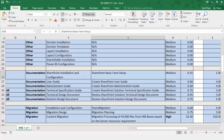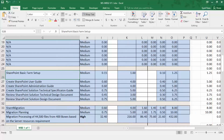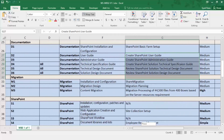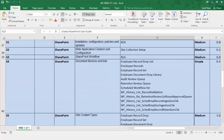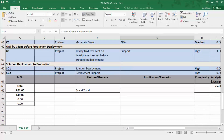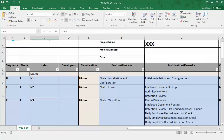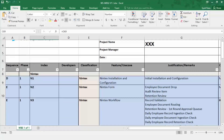For example, SharePoint farm setup: we are going to do SharePoint installation and configuration, taking about an hour to an hour and a half per individual. Notice we don't name the individuals here — these are just hours provided from the respective departments. You as a project manager take these tasks and place them into the project schedule using Project Server or any other tool. In the end, this particular project totals 921 hours, so you as a project manager now know the costs typically involved.